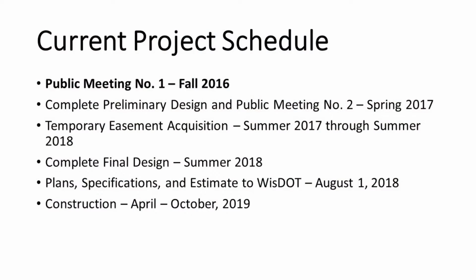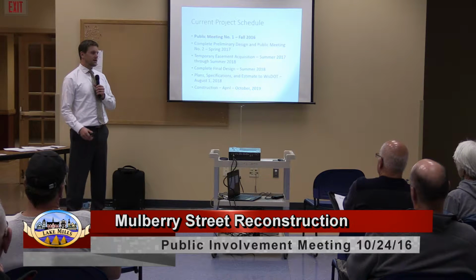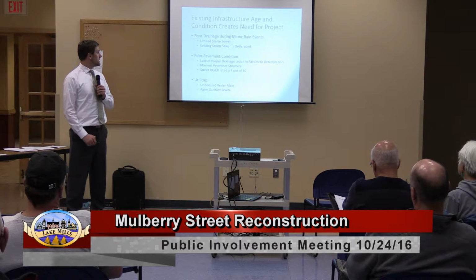Complete the final design in summer 2018 in time for public or plan specifications and estimate to the WISDOT. I'll talk about why WISDOT's involved later, but we have to have those to them by August 1st, 2018 to make our bid letting and allow construction to proceed April to October of 2017. The April to October is approximate. That's kind of just the construction season in this part of the state.